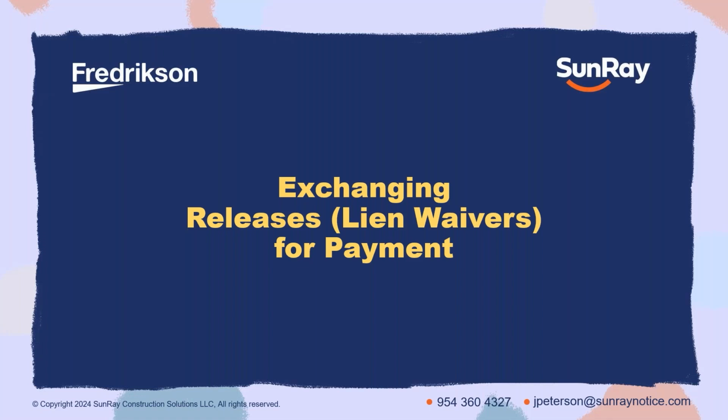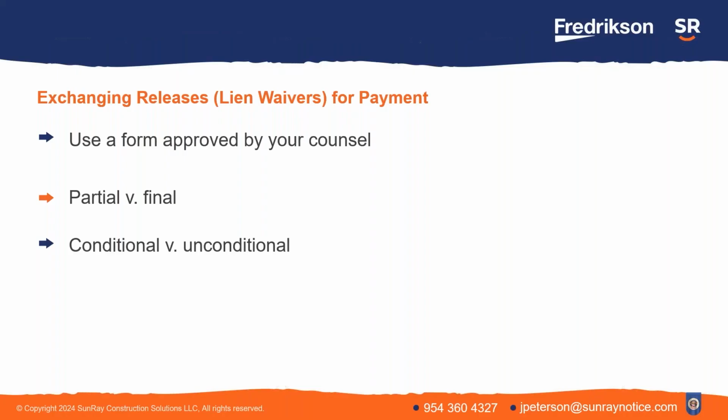Finally, the topic of lien waivers. Throughout the project, you're going to be getting progress payments perhaps, or certainly at the end, there's going to be a final payment, and the owner or the contractor, if you're a sub, is understandably going to ask you for a release or a lien waiver. Use a form that you've got approved by your lawyer. These can be a little tricky. There's not a prescribed form that has to be used in Minnesota. Some states do have a required form. Minnesota does not, but you should certainly make sure that your lawyer looks at the form you're using.